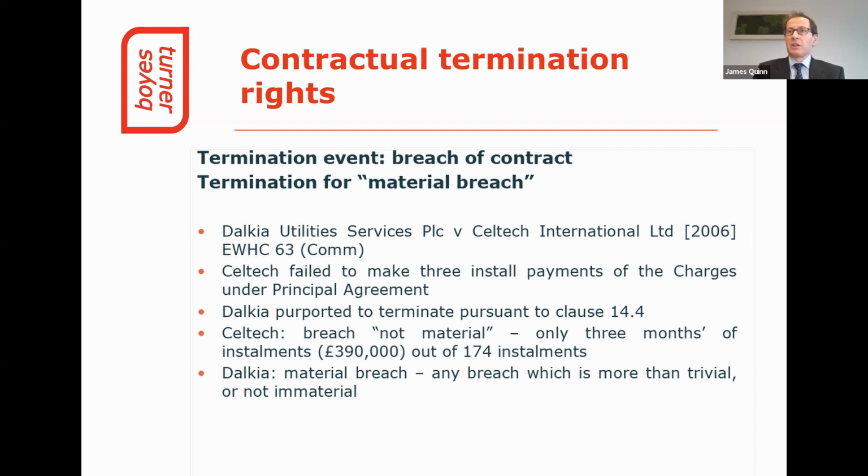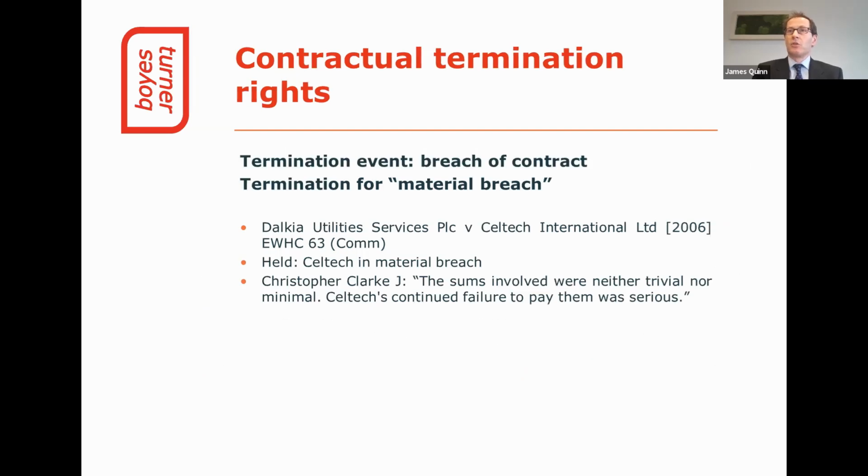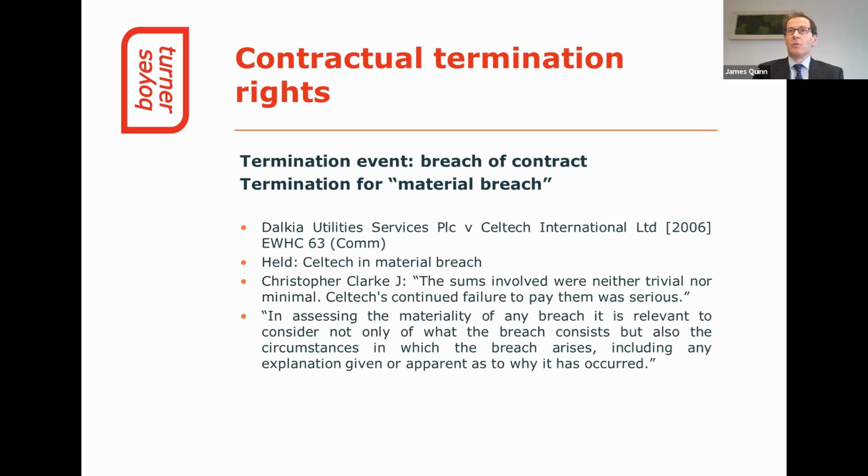In the proceedings, Celtec argued that the breach wasn't material as it concerned only 3 instalments out of 174 over a 15-year period. Dalkia's position was that a material breach was any breach which was more than trivial or which was not immaterial. Mr. Justice Clark in the Commercial Court held that there had been a material breach by Celtec in failing to pay the 3 instalments.